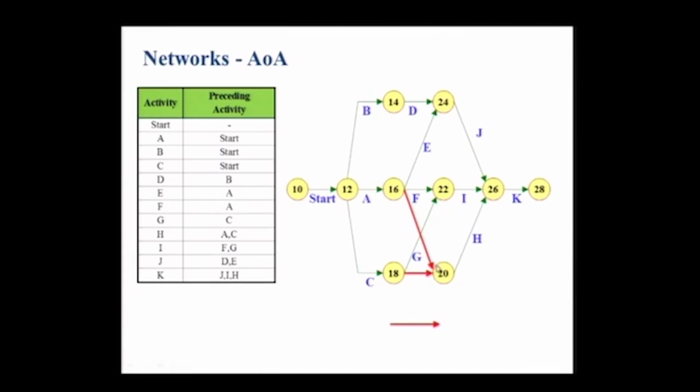If I join from, so what AOA requires is the concept of dummy activities. So we have two dummy activities which enable us to create this node and then link 20 to 26 and make it H, okay. So it is not just the inclusion of dummy; even with representing E you might have had some difficulty, okay. You would have started off with one loop and found, oh, there are redundant activities coming in and things like that, okay.